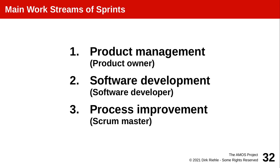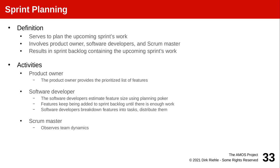The work streams are assigned to different people, but the key is that these people work together as a Scrum team in key events. Sprint planning defines what to do in the upcoming sprint — everyone is involved, and the output is stored in the sprint backlog as what developers commit to delivering over the coming week. Developers have the right to determine the total amount and complexity of work, while the product owner still prioritizes which features are addressed. The Scrum master observes team dynamics and may take action outside the meeting.